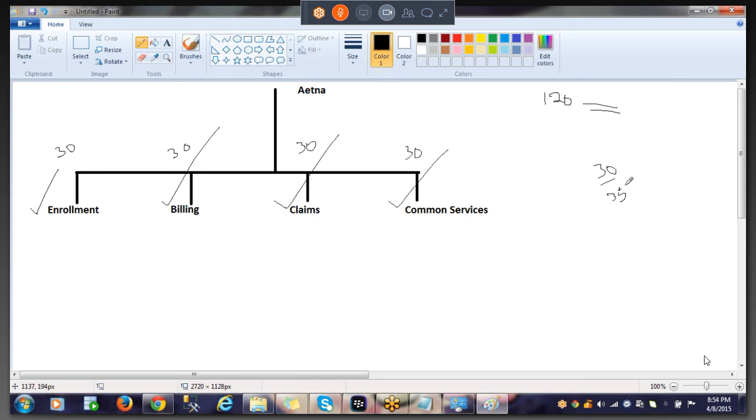But the important challenge within this particular model is every team should be effective enough. You should have the same level of capability. That is what is required in the RAD model. I am working on enrollment. I should be capable enough like you are. Otherwise, my deliverables would be delayed, whereas your deliverables would be faster. If I cannot catch the same pace as everyone else, then I'll be lagging. Enrollment will be lagging. So that is what the project manager has to take care of when going with this kind of model.